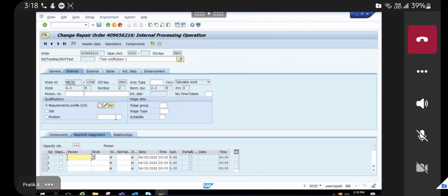Yeah, Pratik, Kiran here maybe. Have a query. So this particular scheduling part of the work order is possible only after releasing the order, or before that also we can schedule? We can do that, but it makes no sense. It's always like if we have the approved work order, only then the scheduler will schedule it, right?